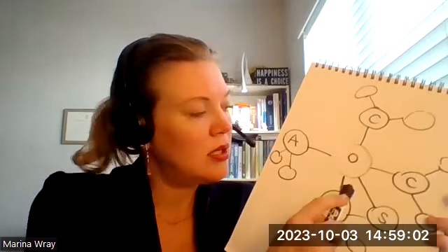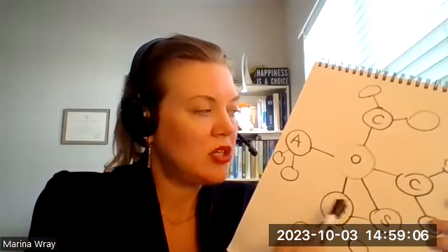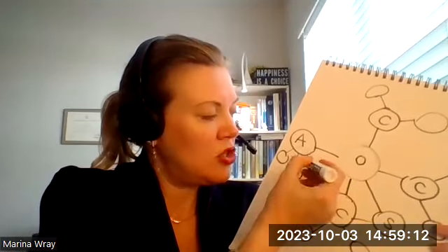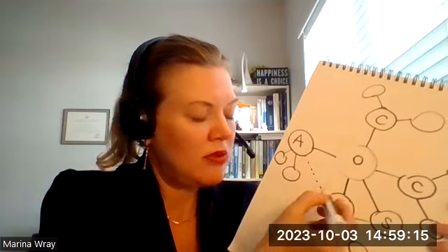As far as the forms of agreements, as I mentioned, the owner always has contractual obligations with the contractor and with the architect. The architect and the contractor never have direct contractual obligations. That will only be design build, if that is all in-house and the contractor and the architect work together.